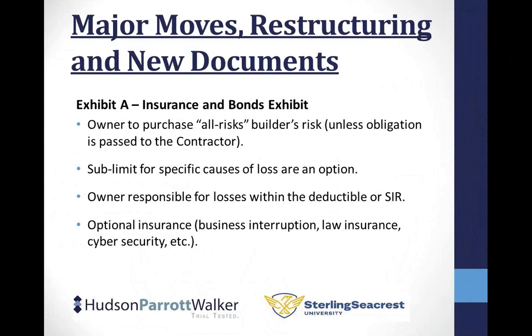Hey, Doug, can I point out one thing that is a little different, relating exactly to what Doug just said? If you look at what's in quotes here, they're two small words, but they go exactly to the heart of what he's talking about. That all risk builder's risk policy matters when you talk about owners, because owners are going to come back and say, well, I already have a property insurance policy. And since I have a property insurance policy, I don't need a builder's risk policy.